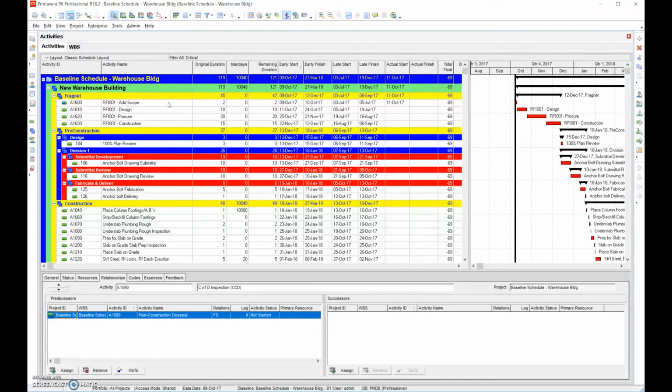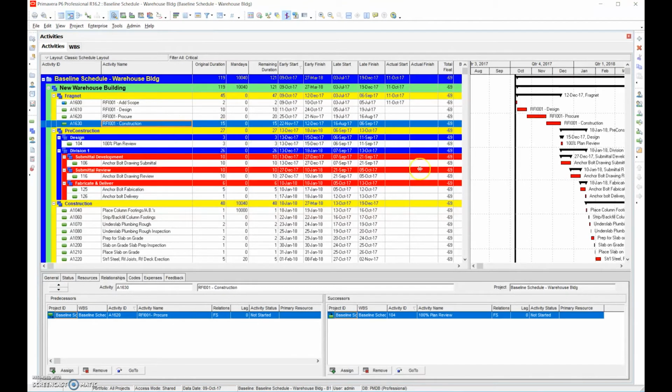So that's what a Fragnet does. Okay. Now, once again, if this didn't tie into the critical path, then we wouldn't be entitled to any additional time. So we're going to put the natural successor, and then at the end, this is something a lot of people don't do: they do a Fragnet schedule, but then they don't do a narrative associated with it. You have to explain the logic involved there.